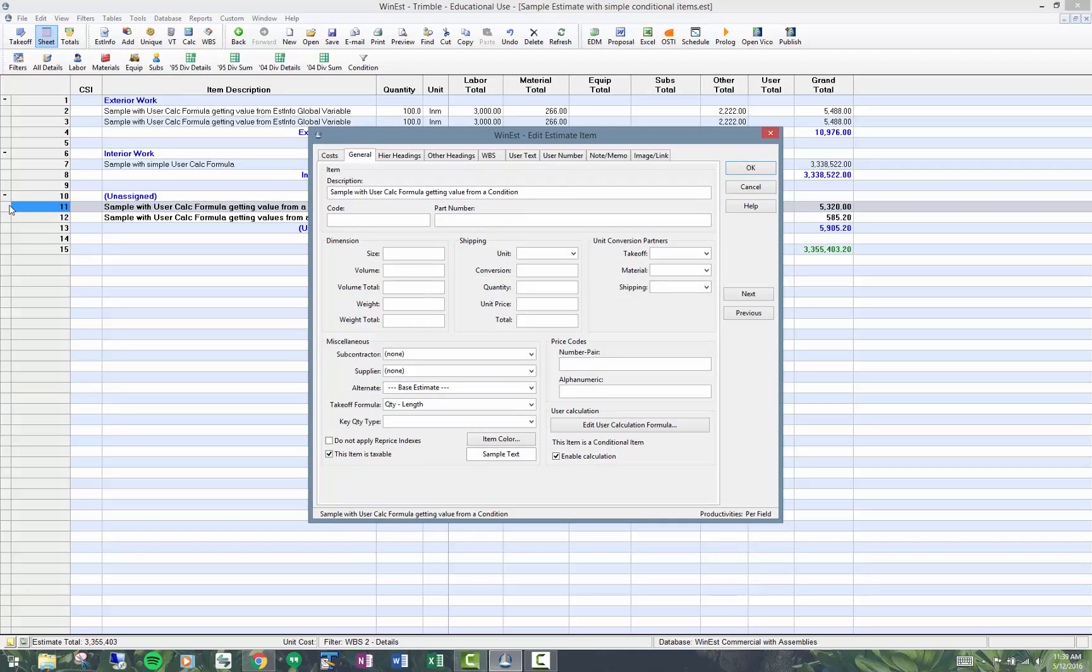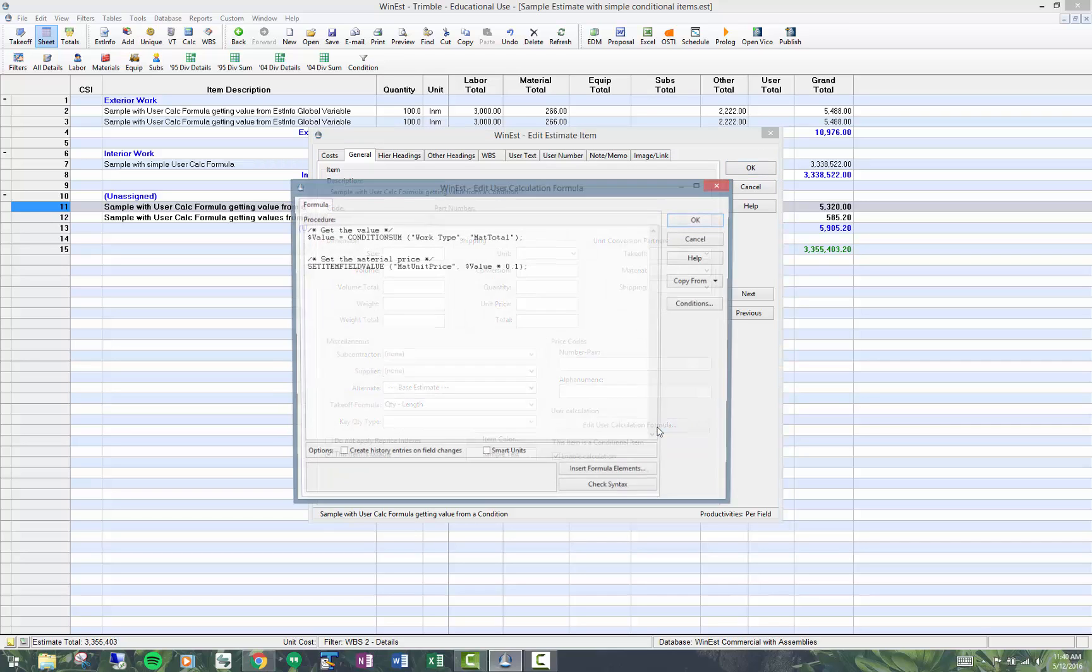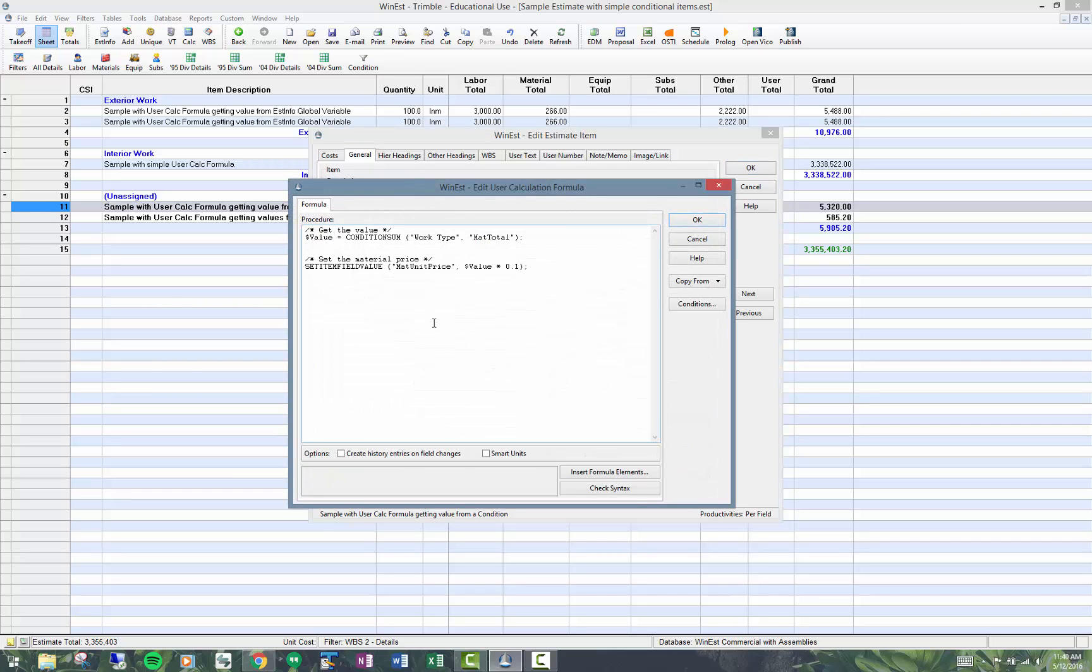I'm going to open up edit estimate item. There's a button here called edit user calculation formula. I'm getting the value from a condition sum called work type. I'm getting the material total, that should be the $532. I'm setting the material price in this item as 10% of that value. You can see right here, set the material price times 0.1.